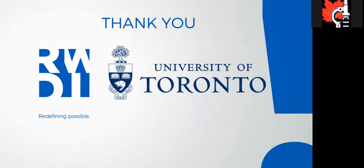Yeah. One of the requirements outlined in the U of T standards is the handover acceptance checklist. Can you confirm that the University of Toronto expects, or rather assigns, responsibility for things like O&M manuals and as-built drawings to the commissioning agent? The commissioning agent is responsible for the documents and the compilation of those documents for presentation to us and for the signature. So yes, the O&M manuals and the as-built drawings are required as part of that document.